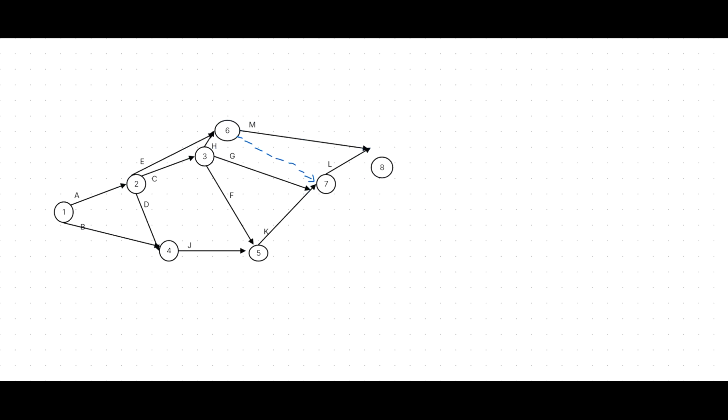Then we can complete the entire project after the 9th event. The question said until N, then finally we should have one ending event as well. It should be the 9th. We complete the entire project. That's the way you should draw the correct diagram.